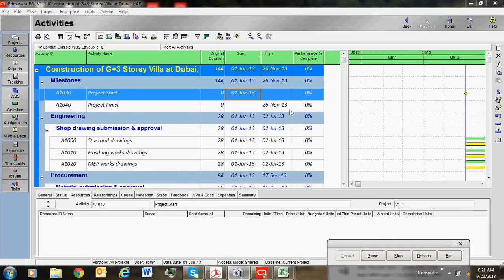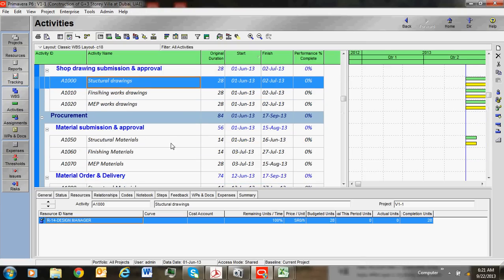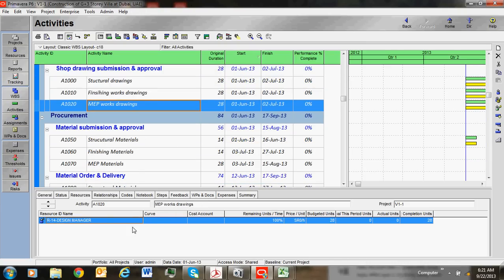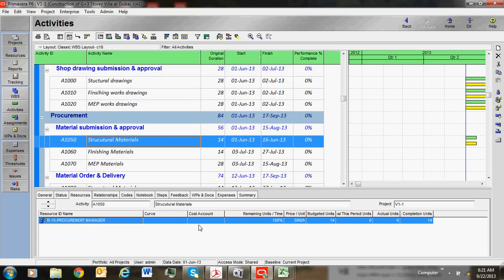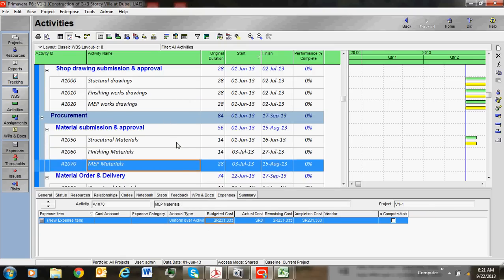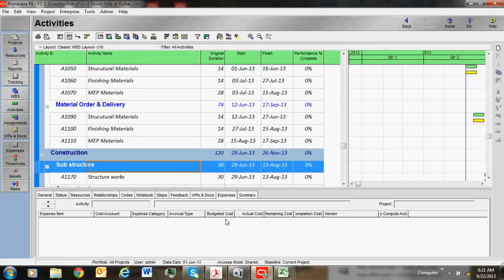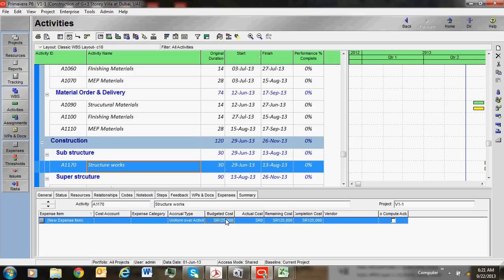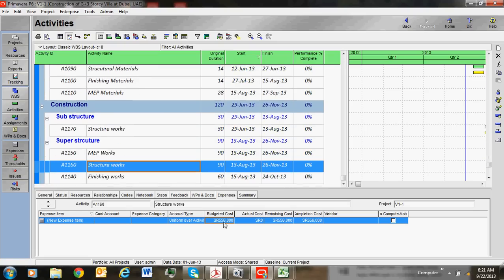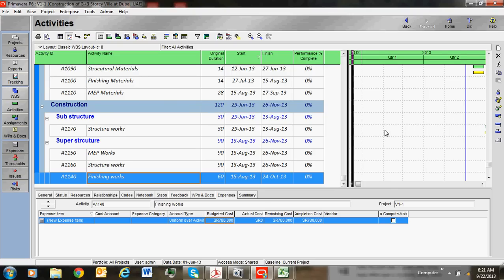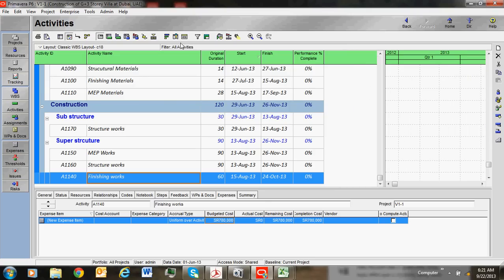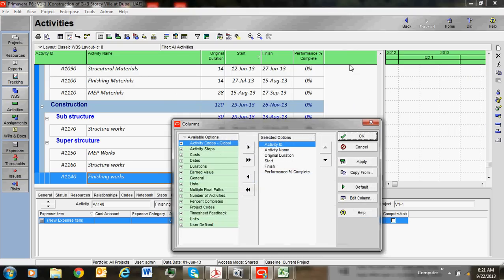Now we have assigned cost for all activities. We assigned cost where it is clear. We assigned the budgeted cost for all activities. Budgeted cost means total cost including labor, material, and non-labor. Now I want to open a column and show you on the right side of this portion.